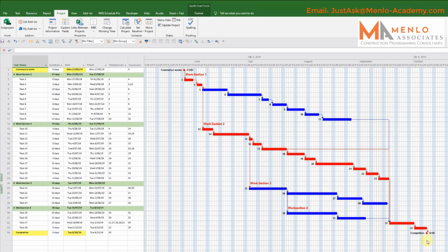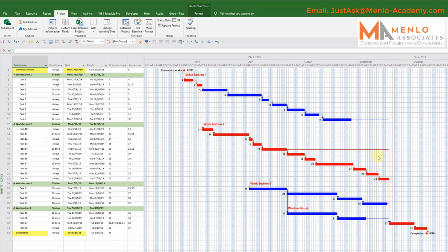The critical path moves around all of the time because the critical path is based on the relationships between all of the tasks. Every task in the job should be linked to something, basically, even if it's only the start and the finish. And those relationships then set where a piece of work needs to start, and where it finishes. And if it's not on the critical path, there's an amount of time of slack.